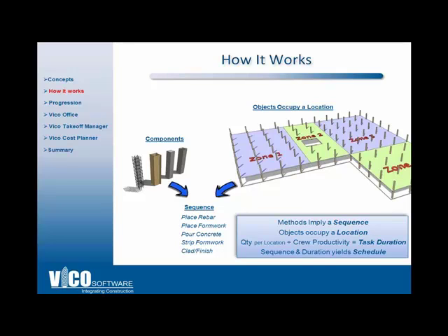If you change the design, if the design of the lobby is different, you're going to be able to change the zone, the boundary of the zone, and update your estimate accordingly. This will help you